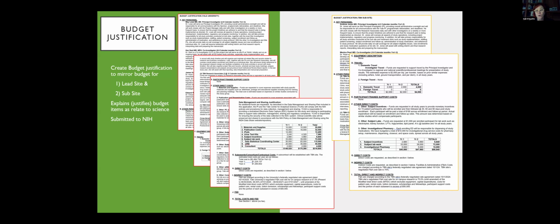And they know right up front that you're paying them for what they are doing, and they have to be very careful. Somebody looking at this in an analytical budget office in your university might say, oh, they're supposed to have gotten $250,000 that year, I'm just going to charge out 250. You can't do that. You can only charge for what you've done.